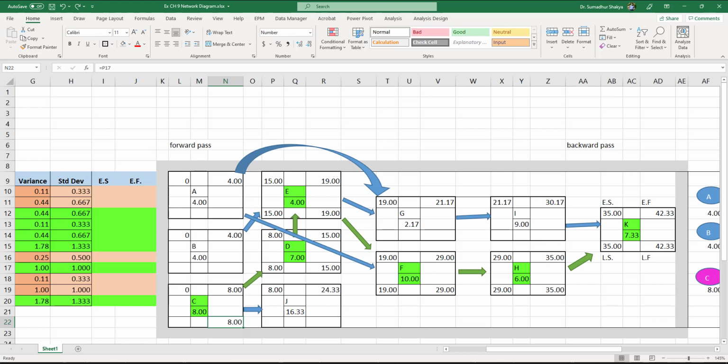So from here onwards, this is the last activity. If this is the latest I have to start for activity K, then the latest finish time for activity I, even though it is non-critical, has to be equal to the late start of the activity on the critical path prior to that. Now, once I know that I have to finish this, the latest I can procrastinate activity I is 35 weeks. 35 minus 9, that's going to give me the latest start time. So equals 35 minus 9,